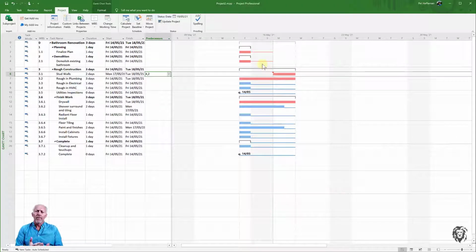Not really my preferred. When you get into playing on the Gantt chart view itself, we tend to start to play with our biases and how we envision the schedule coming and forcing it to do what we're thinking in the back of our mind, rather than looking physically at what those dependencies are and trying to implement them and let the schedule do the schedule. Let the program manage that space. We're going to have lots of opportunity later on when we look at resources and other allocations to manipulate the schedule. So for now, we just want to let the program manage the schedule. So I'm going to do most of my work over here on the entry sheet.